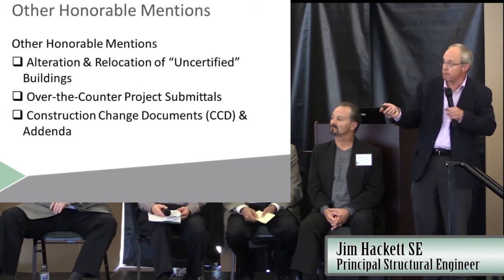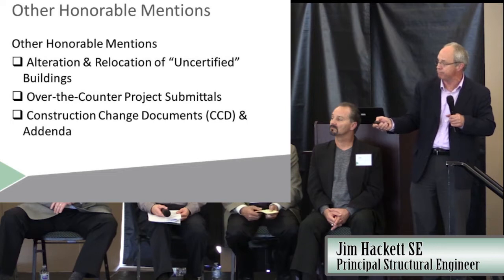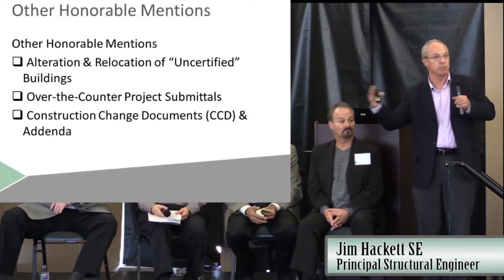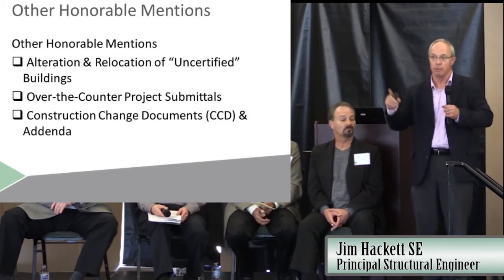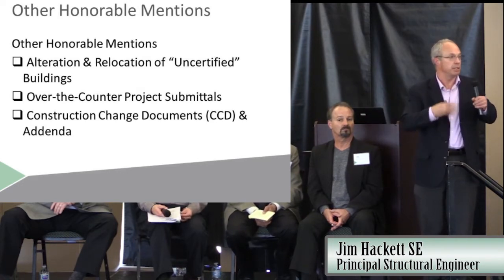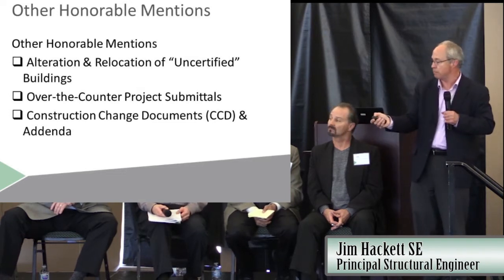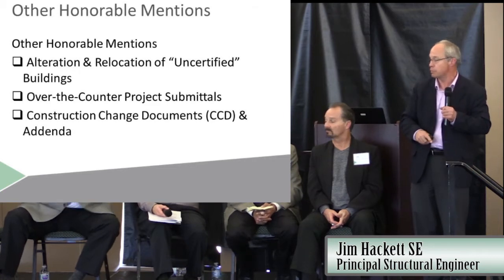Another way of doing that is from the old files, if the project was not certified, because you might have multiple buildings as part of a larger scope of a project, you can still relocate that building, provided you have an in-plan inspector's verified report. And we've allowed that to take place over the uncertified buildings to allow you to do those.